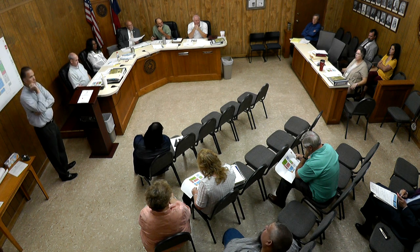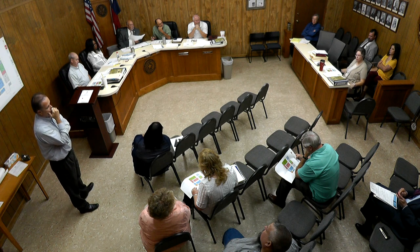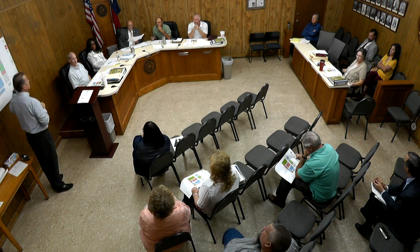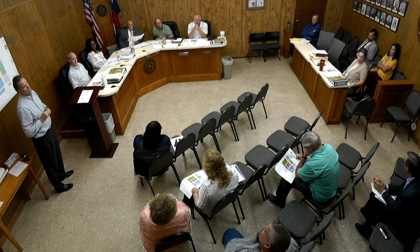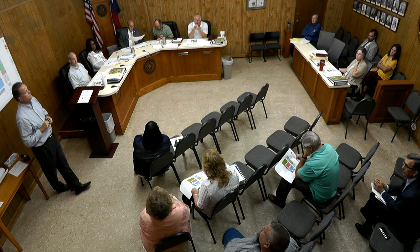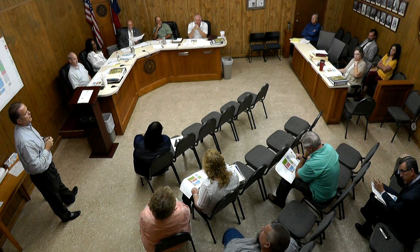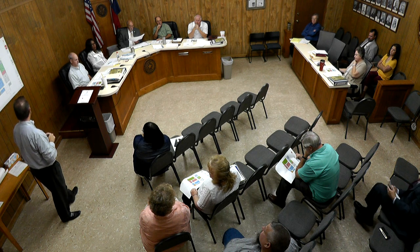What would the cost be if you took the build out of the courtrooms? Took the build out? To shell them? Well, we have other options that could be cheaper. Is what she's asking. Oh, yeah, the millwork. The millwork. It requires other things that come with it, but I would think $200,000 to $400,000 per courtroom.